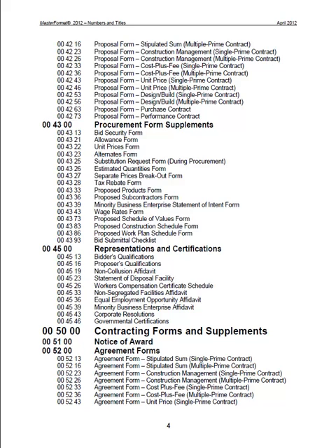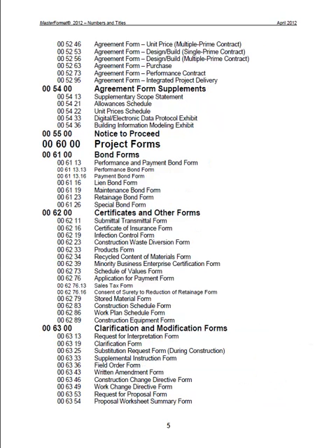Procurement forms. Anytime we have a large project, we need to make sure that we're being billed for work that's been done and only work that's been done and material that shows up on the job site. Your schedule of values and units form have to be filled out. Your bidder qualifications, representations and certifications that might be required, contracting forms. This is all just your AIA, normally AIA documents. Just more agreements, project forms, bond forms.